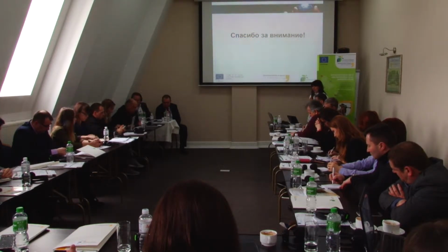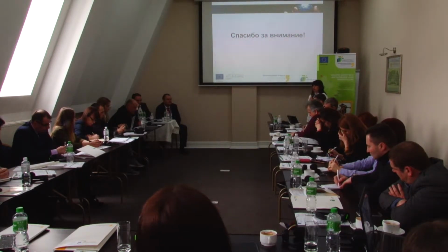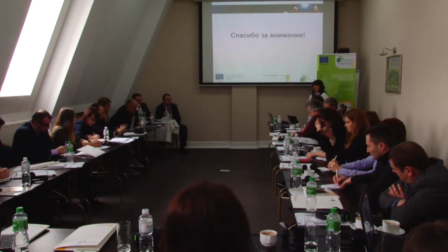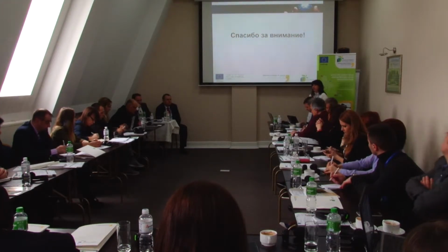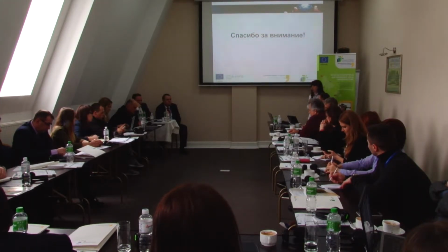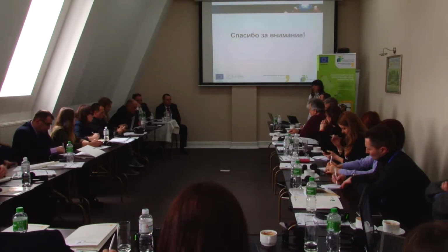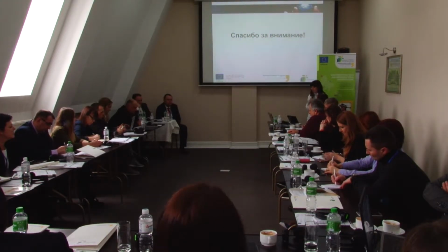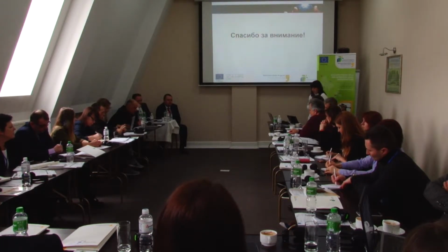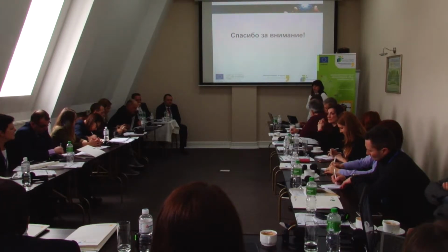Besides that, the contract with the designer, in our case, included provision of the necessary technical assistance in the drawing up of the declaration for the commencement of construction works, because you know customers may be NGOs, maybe municipalities, maybe governments or departments of education, and they don't know how to draw up these documents and what technical parameters need to be set there, while all the necessary information can be provided to you by the designer who dealt with the development of technical design documents.